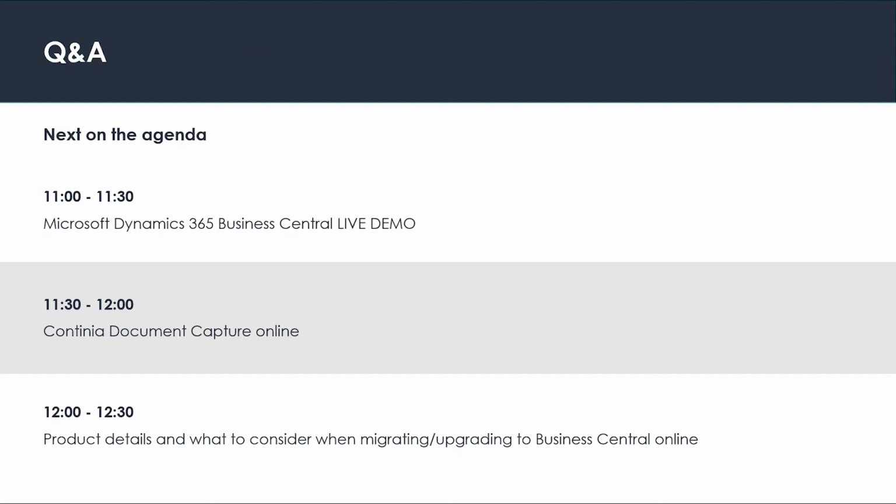Can I just add something? At the same time we went through all our processes again, just to look them through and how we're doing those, so that the whole company knew what the processes look like, even in the country, the UK, where we did not have NAV. So we've been looking at that at the same time, which is really important if you're going to do this project in 4 months. And we also had a working assumption that the standard functionality in Business Central should be our first choice. And if you need to do something else, you should really have a business case for doing that. And me being a finance guy, I knew that what's there from a finance perspective and being standard is most likely good enough for us.